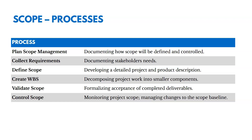In collect requirements, we're documenting our stakeholder needs, figuring out what they want. Then we're going to define scope, developing a detailed project and product description — sometimes just a few paragraphs. Then we take that scope and break it down, decomposing that project work into smaller components to make it easier to manage. That's creating the WBS.